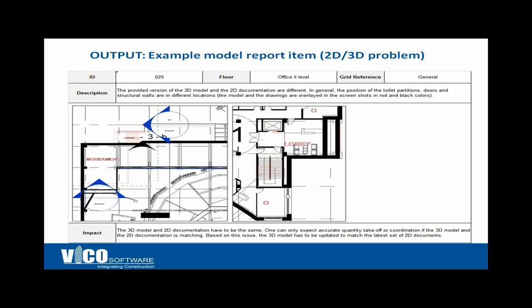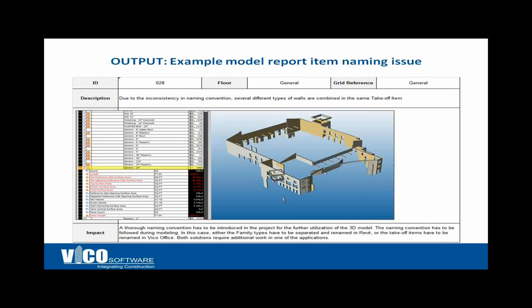We need to assess whether it's easier to repair them or maybe replace them. Here's a naming issue — not a big job, but one you can avoid if you get the family names planned in advance with the design team. A good naming convention really helps cost planners and estimating folks in pre-construction plan their line items, so that line items come together and are grouped properly, making reports complete and pricing comprehensive.